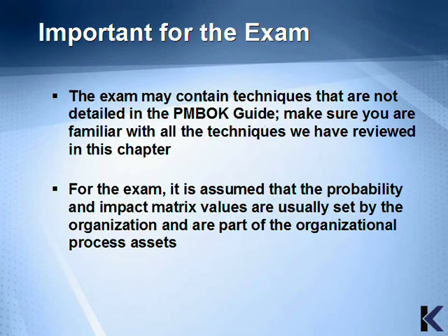The exam may contain techniques that are not detailed in the PMBOK guide. Make sure you're familiar with all of the techniques we've reviewed in this chapter. For example, the decision tree analysis. For the exam, it's assumed that the probability and impact matrix values are usually set by the organization and are part of the organizational process assets.